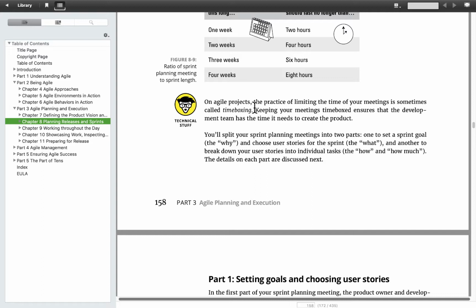There are two aspects that really work for Agile. Time boxing. A sprint is a time box. For us, it's going to be 2 weeks long. It keeps pressure on the team to only do the most important things. To the extent that you feel that you can expand the time box, well, then the pressure releases. You lose that benefit. So we're not going to expand the time box. We're going to keep the sprint the length it is.